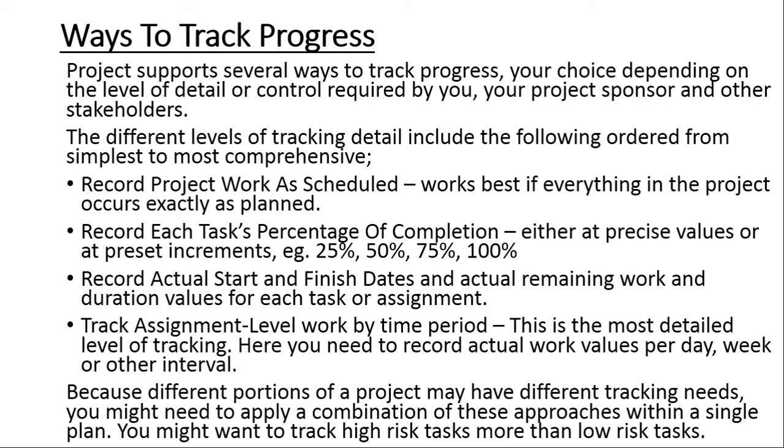You might want to track the high-risk tasks more than the low-risk tasks. In other words, we cannot use just one method for the whole project, because some tasks don't require a lot of accuracy in reporting, while others require precision in their reporting.